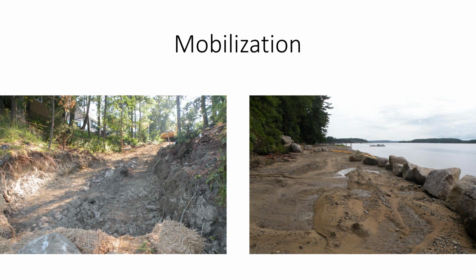On this project, there is 1,500 square feet of temporary impact, and you're looking at all of it in this photo, and only 75 feet of permanent impact, and then you've got your other impacts to the tidal buffer zone, 1,900. So this little depression was a trap for anything washing down on that slope on the left side that then could be graded out. This is all beached, it's not vegetated, but it's all a tidal resource. Next slide.